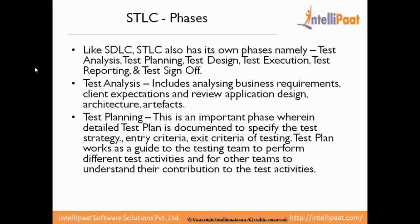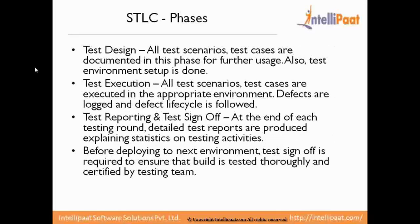The next phase is test planning, which includes detailed planning covering the test strategy on how testing will be carried out, how environments will be maintained, the entry and exit criteria, the different resources required in terms of hardware, software, and number of people, what tools will be used, whether it will be manual or automation testing, what types of testing will be covered, and if possible a testing schedule that embeds with the overall project plan. The test plan becomes a user manual or guide for the testing team across all test activities.